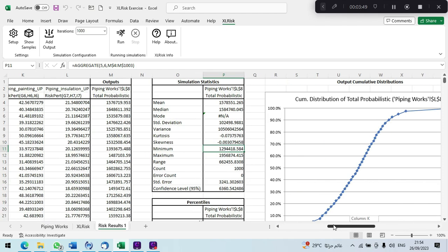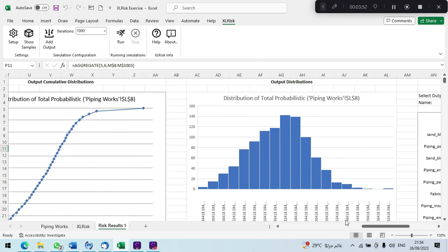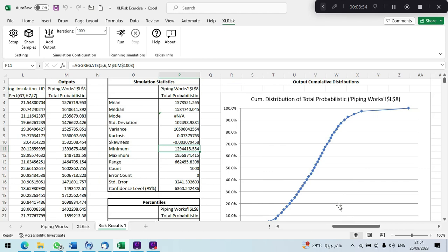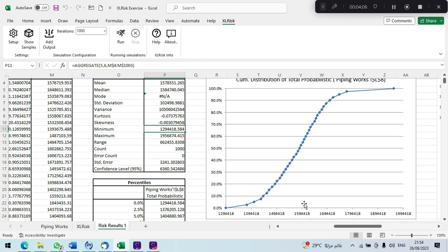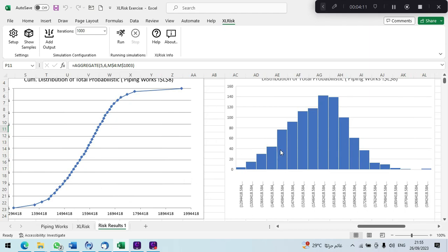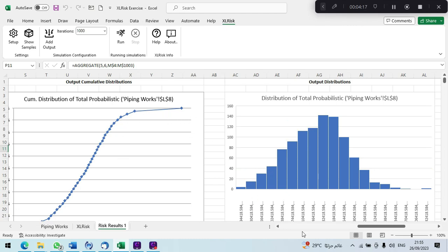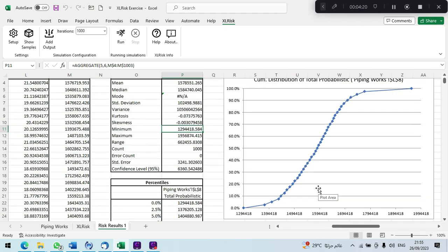You have to do a cumulative curve for this one. The cumulative curve is our cumulative distribution or probability function, sometimes called the CDF. From here, it is just continuously summing each value for each column and going up until we sum the total cumulative value for the whole histogram. And from this curve you can extract the P80, the P50 and the P10 if you want. So let's do an example here.